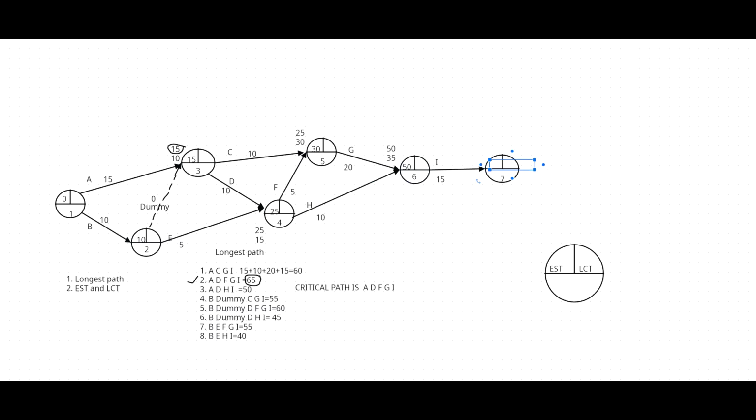That's the way we calculate the early starting time. Remember, when we calculate the early starting time, we need to add the activity duration and select the highest value if there is more than one path.